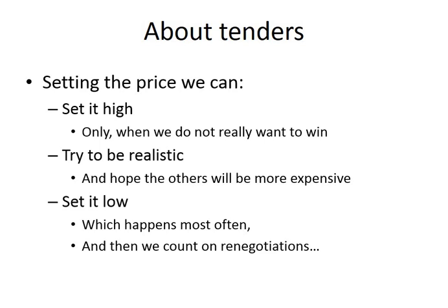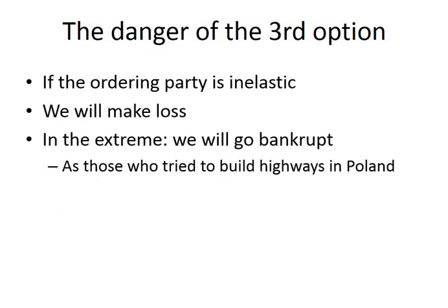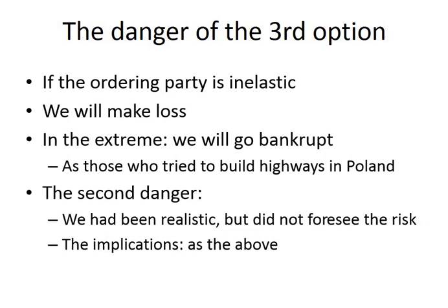and your chances of winning the tender become high. But there are some dangers connected with it. If, because of some unforeseen circumstances, your costs go higher, you can lose money. You can go bankrupt if it is really bad. And on the other hand, even if you think you were realistic, some unforeseen circumstances somehow appeared and you still lose money.